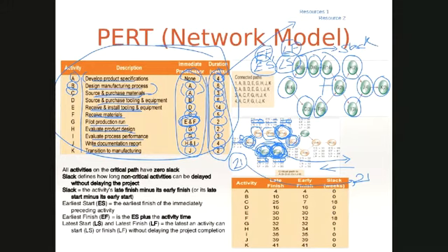How you strategize is going to be completely up to you. I like to push it back, but of course there's a cost of pushing it back, which is in case things don't work well and something goes wrong, everything else is likely to be delayed too. So you could decide on how you want to play around with the variance.